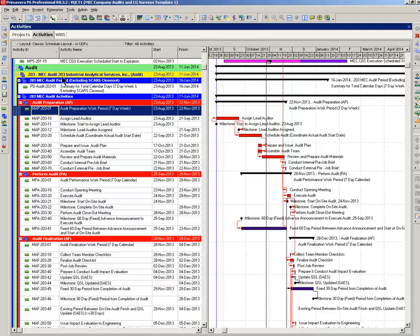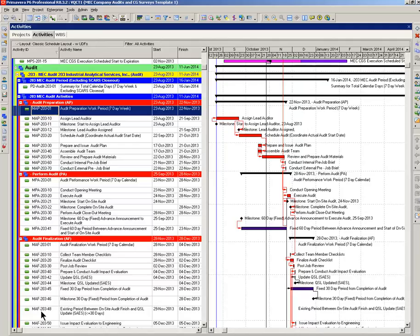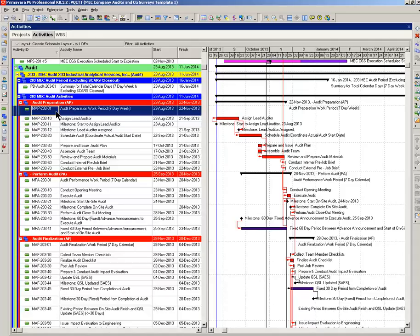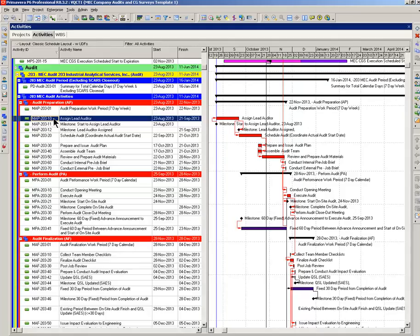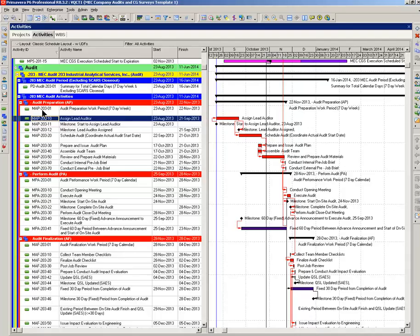So, every activity within this particular audit will be, the middle section will be 203. In your next audit, number 204, the entire middle section will be 204, and so forth. The last two digits in every activity ID is the actual increment in the activity value. Now, for every audit on audit prep where you assign the lead auditor, you will always end in 10. So, let's go down the list.